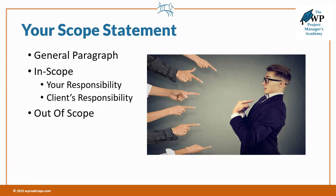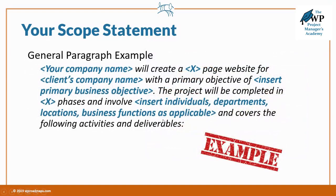Your out-of-scope section is going to come from your project plan template and your initial pre-proposal discovery, because you're basically going to take the activities and tasks you normally do for a website and eliminate the ones that are out of scope. For the general statement, your company name will create a certain number of page website — or if you don't know the number of pages, just say your company will create a website for the client's company with a primary objective based on your business requirements.